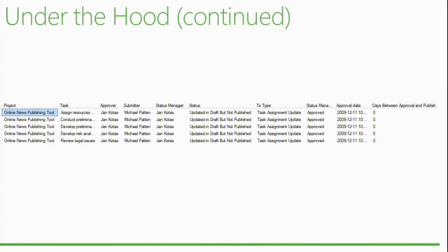After it's approved, as you have seen, someone has to open the project plan to receive the updates, and then save the project plan and then republish it. If it's not republished, it will never end up in the published database and never be pushed to the reporting database. So I can tell you in most of the cases we have seen, this is related to this. There is nothing nefarious happening in the database or in the scheduling engine that is going to gobble your updates and throw them somewhere in some black hole of the system, and they will never reappear. They are always there in the database.